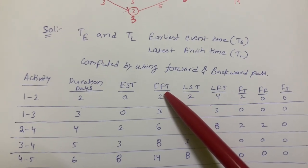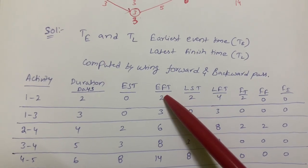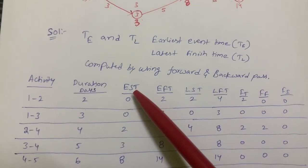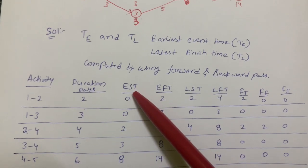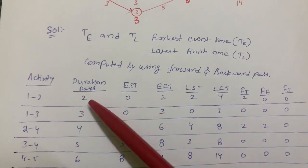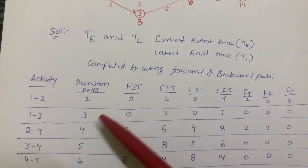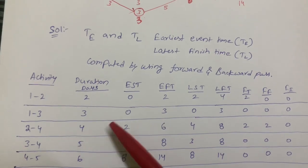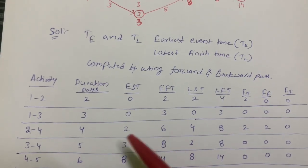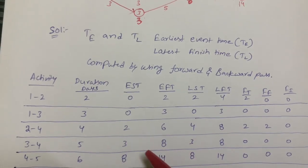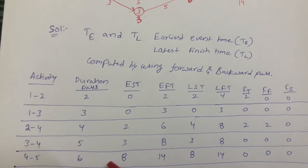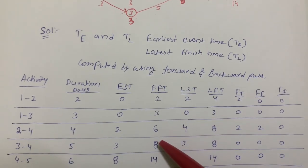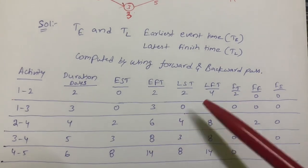After calculating EFT, we derive EST by subtracting duration: EST = EFT − duration. So: 2 − 2 = 0, 3 − 3 = 0, 6 − 4 = 2, 8 − 5 = 3, and 14 − 6 = 8.